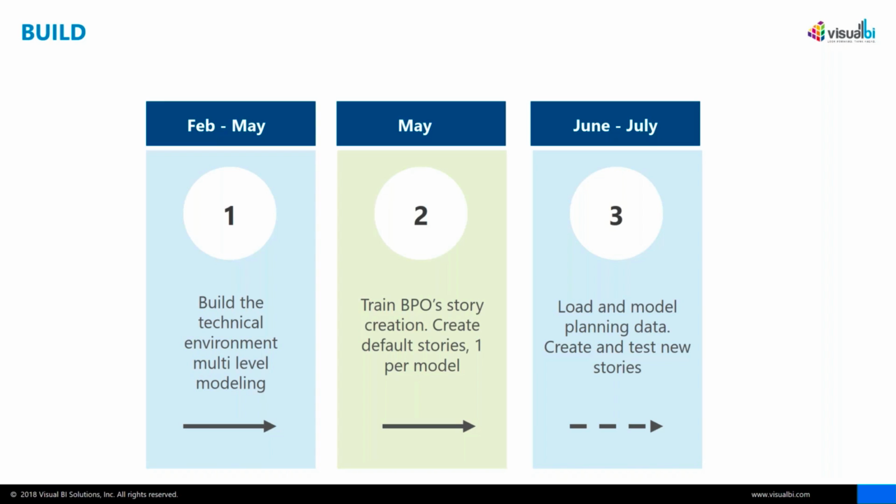Now, that said, it's the first time our business got exposure to some of these things. And so it took a little longer to process it, to understand, now that they saw the models, what these stories could do, what kind of answers they could get. The testing cycles just became longer, not because the data was incorrect, but because they got more excited about all sorts of answers that they could get that they didn't really understand in the past.